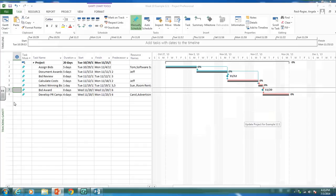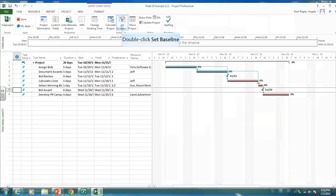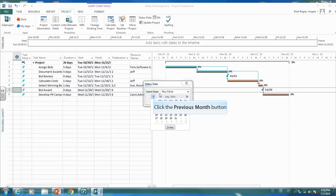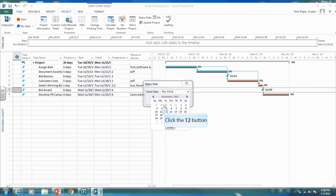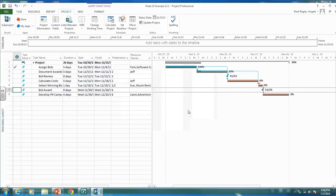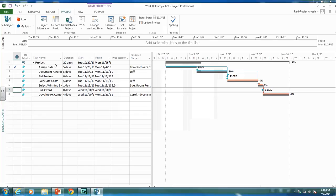We want to add some status, because nothing ever goes exactly as planned. Go to the Project tab and enter a status date of November 5th. Select Update Work Complete Through November 5th, set 0 to 100% complete, and apply it for the entire project. MS Project then assumes everything has gone as planned — so the first activity, planned from October 29th to November 4th, shows as 100% complete.